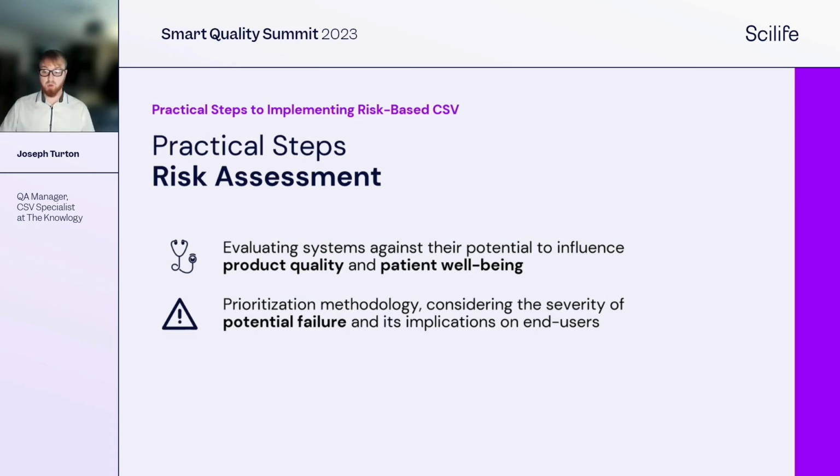We can use qualitative and quantitative methods that we discussed earlier to determine the severity and potential of failures and their likelihood. So an example of qualitative assessment, say through expert consultation, we might understand that a failure in our lab's equipment calibration system won't directly affect patient harm, but could delay drug releases, resulting in financial and reputational impacts. Hence the risk might not be high, but it's undoubtedly moderate.